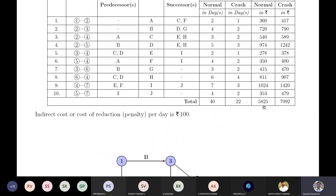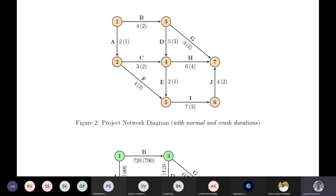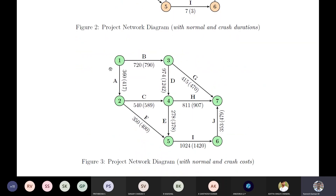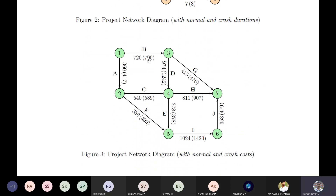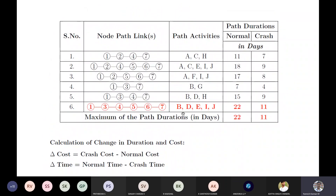The total normal cost is 5825 and total crash cost is 7092. The maximum crash duration is 22 — actually the total crash duration is 22 — and the normal duration is 40, so we need to find the optimum duration and its associated least cost. This is the network diagram for the given problem, where duration outside the bracket is normal duration and inside the bracket is crash duration. Similarly, cost outside is normal cost and inside is crash cost.